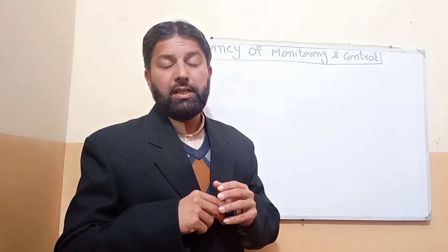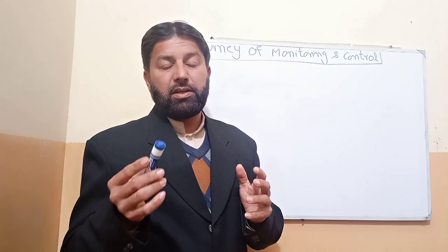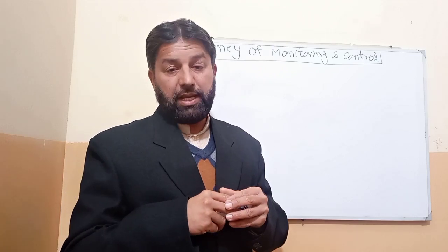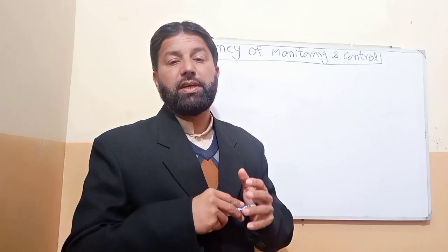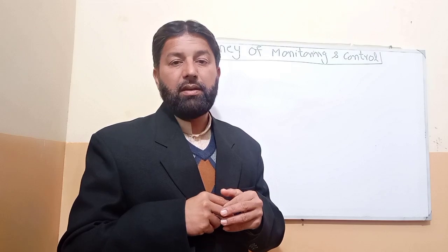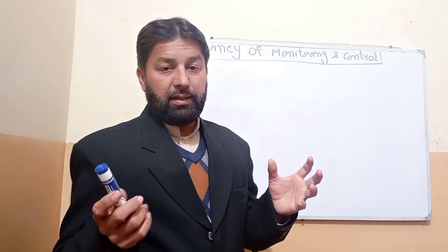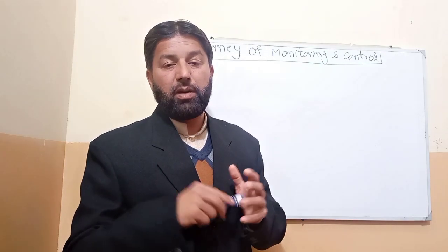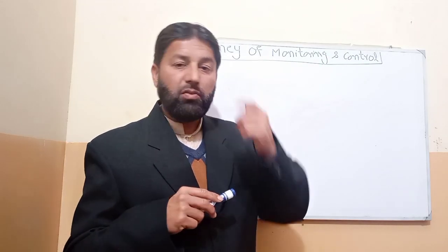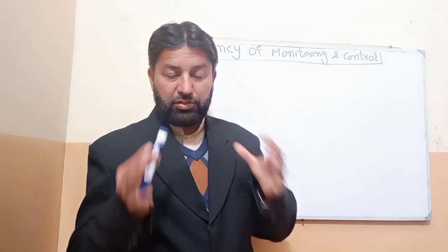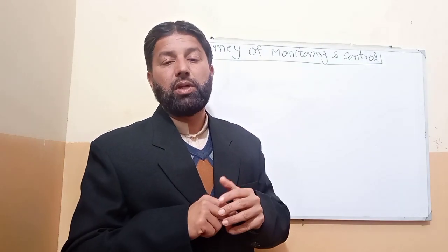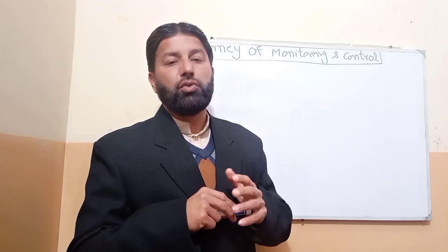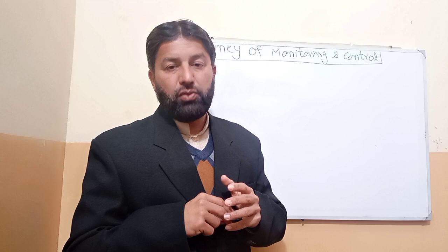And we will also monitor the risk here. We will check residual risk, we will check secondary risk, and we will check the effectiveness of the risk responses. And we will also get lessons learned here. We will get new lessons learned, and we combine them with the old lessons learned and put them in the lessons learned register, and later it will go to the lessons learned repository, and we will use it in future projects.